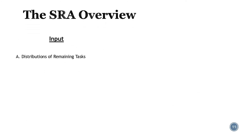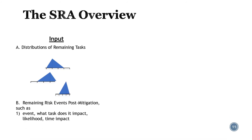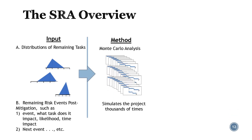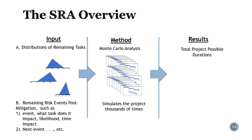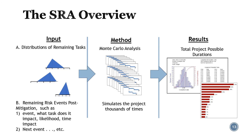To summarize the SRA process, the project team takes the remaining tasks in the integrated master schedule and assigns a three-point estimate distribution to each. They do this by evaluation from subject matter experts for the critical, non-critical, and high-risk tasks, but may allow the software to use a probability distribution band for the remaining activities. Also include any remaining risk events that were not fully mitigated. These values are fed into the SRA software which, using a Monte Carlo statistical analysis, calculates the results over and over each time using a different set of random values from a probability range of each activity. The modeling simulation produces a distribution of possible outcome values and reports the probability of any given date being successful, plus a prioritized listing of the activities which have the greatest impact to the project's outcome.